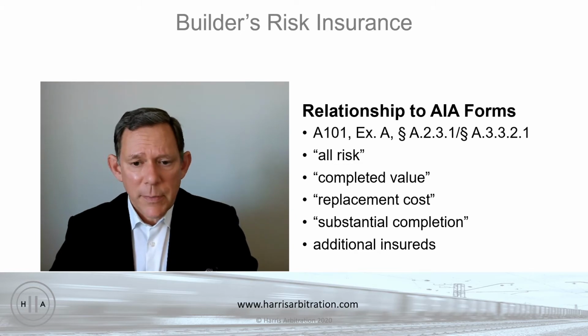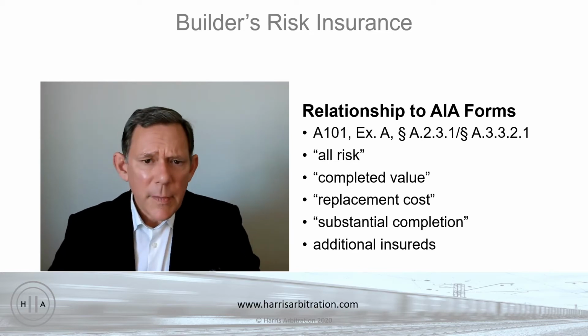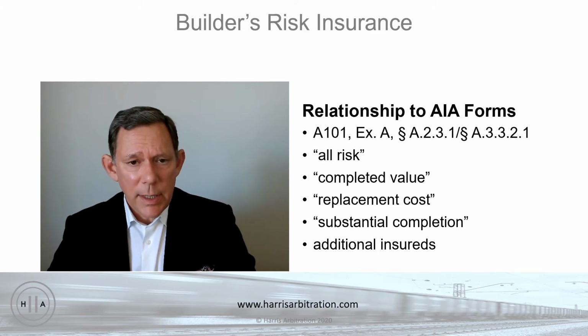So, for example, the AIA form requires the builder's risk to be written on a, quote, all risk basis, excuse me, as opposed to a named peril basis.